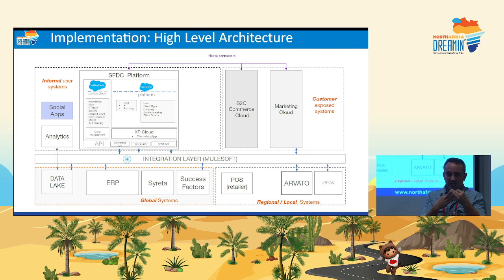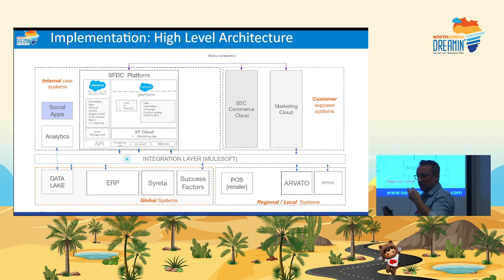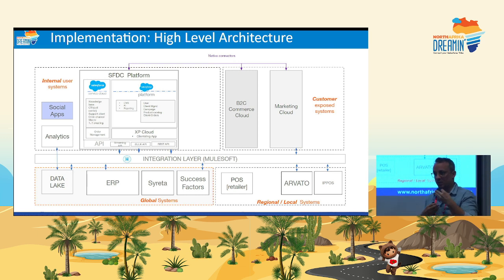You should define the flow for your development, where you would typically have the different stages. So building stage, code review, another stage for UAT or QA, and then the release. So you should have a good process defined for your implementation. This is kind of the beginning of the project. So depending on the people that are working there, there's going to be a learning curve, but this is the core of your project, so it's going to give you the experience to then speed up the deviations.